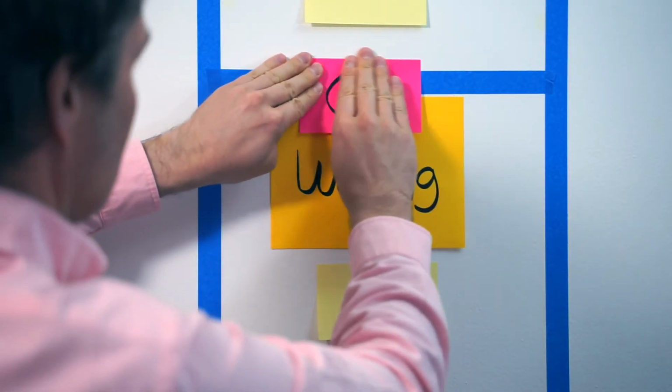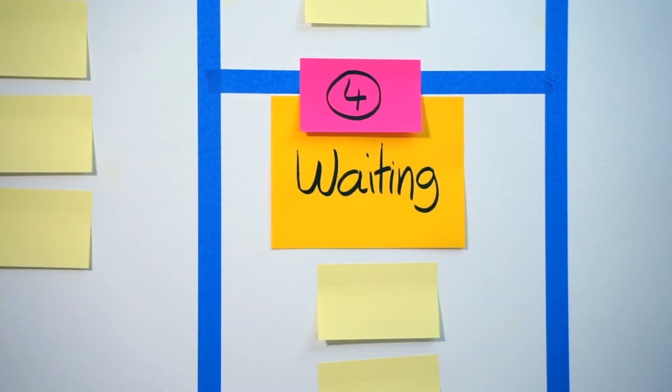Why? If you do not also limit the WIP in that field, your Kanban board will become a huge mess and lots of notes will pile up here. What can you do to prevent that situation? 2 recommendations. Do not pull work of which you know from the beginning that it can't be done at the moment due to the fact that you need others that aren't available.